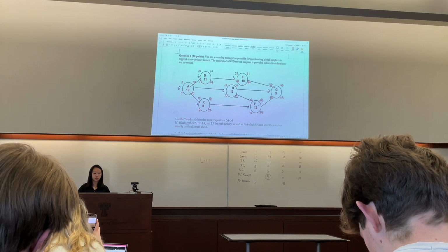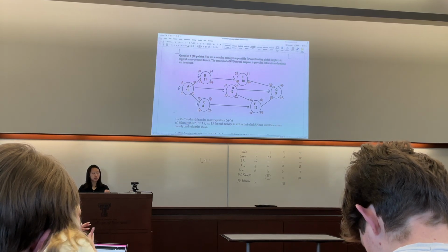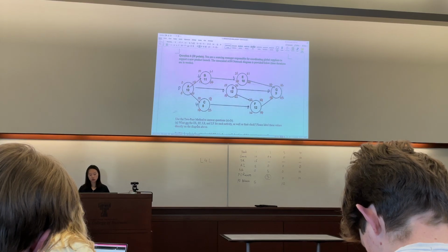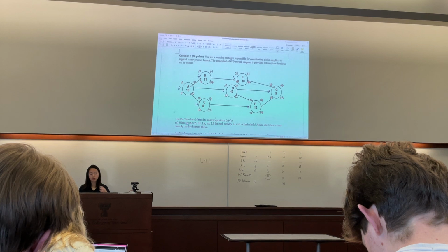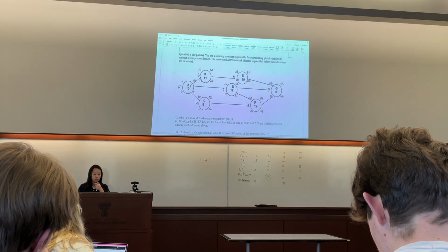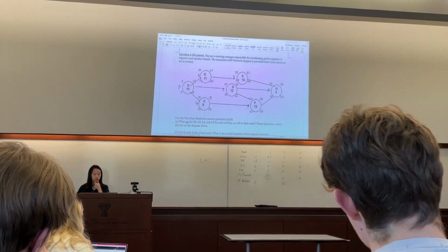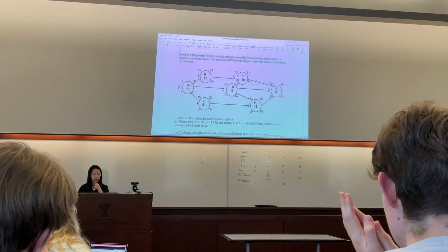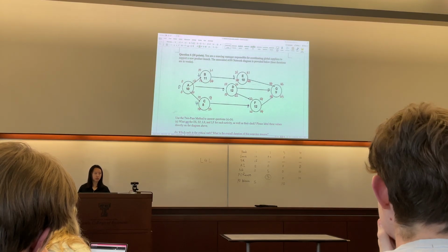And I will show you the AON diagram, and the first thing you need to do is to mark the earliest starting point, earliest finish point, latest starting point, and the latest finish time for each activity, and calculate their slack. And you can just label them directly on the diagram. Okay. Then for the first question, how to mark those times, we need to start with the very first node.